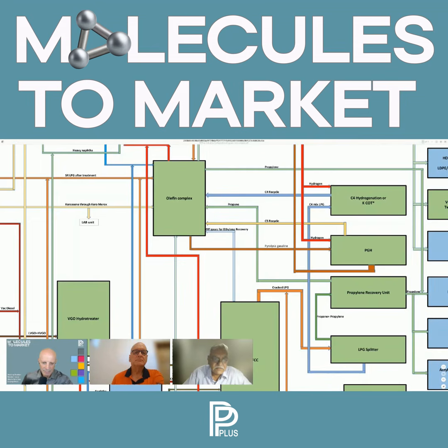That means any effluent which I generate in the plant, we are not allowed to dispose anything outside the plant as such. So in terms of liquid effluent, I must do maximum recycling so that the water intake which is required for the project is as minimal as possible. That is one.